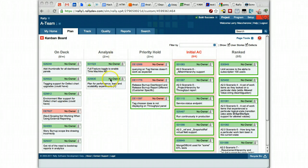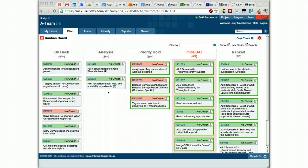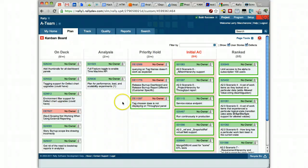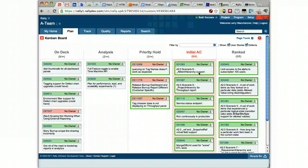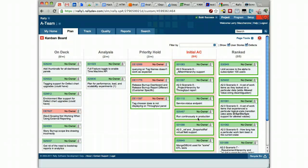I'll refine them a little bit more before I get them ready to go to the team. So there might be six or seven stories for a single enhancement at the upper level. So you have the story hierarchy, but then you have different Kanban boards. The PO can focus at the lower level, the PO can focus at the upper level, the team can just focus at the lower level. For these things, I may be communicating with other stakeholders to try to find out what it is. And when it's ready, I'll drag it into here, and then it'll automatically show up in the initial AC column for the team. Initial AC column says that the team needs to go over the acceptance criteria to make sure they understand them. We'll do an estimate for it, probably refine them greatly, maybe do a little bit of design work as a team.